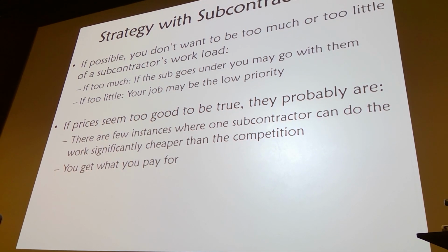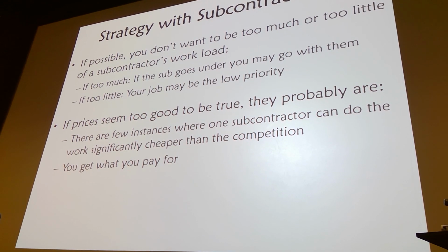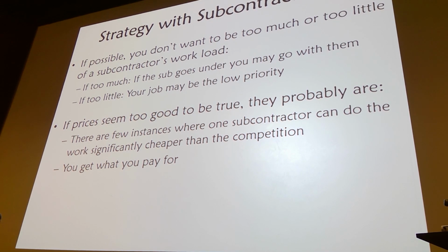Another strategy here, you should always suspect that low bid. That bid is substantially different than everybody else. You should suspect. It's not that it never happens, but a lot of times when you get that low bid, there's a reason. Every once in a while somebody does have a competitive advantage, but I suspect every time. I really do my due diligence to see if there's a reason, if I can justify it.